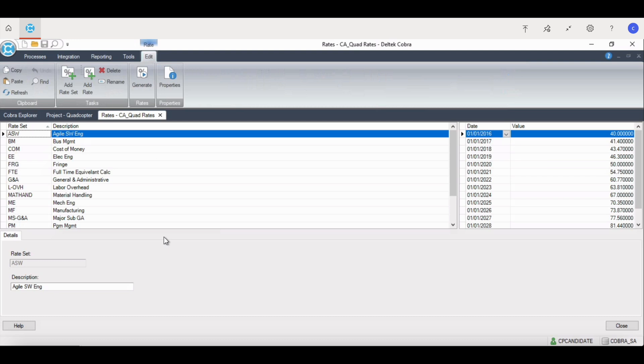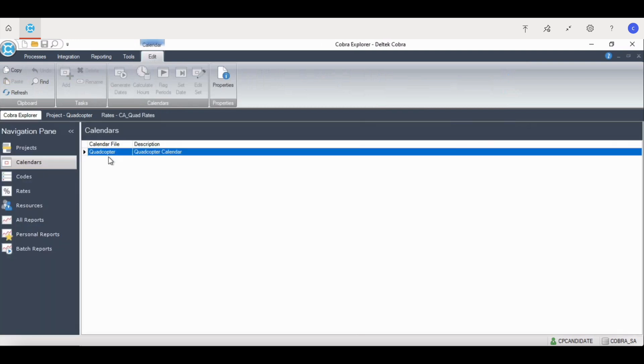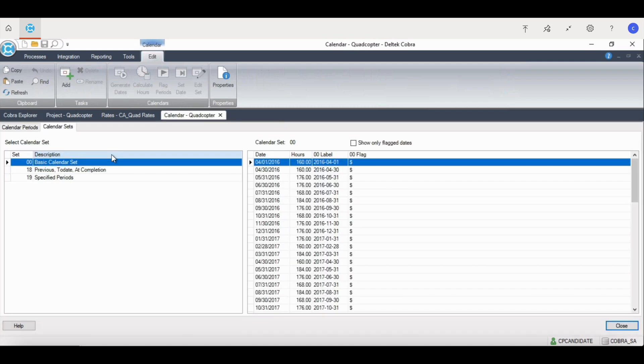This file is the basis for the resource cost buildup. The first ancillary file to build is the fiscal calendar. It's important to align the calendar with your organization's financial reporting periods.